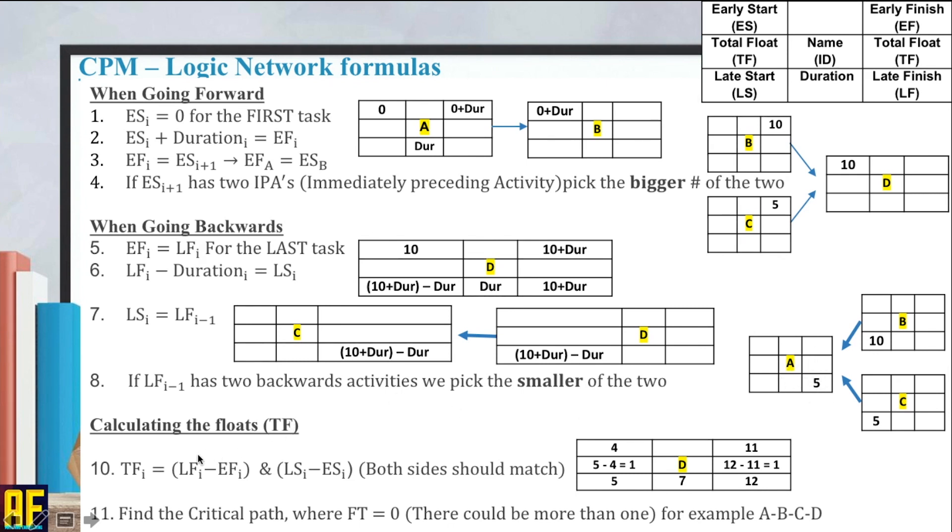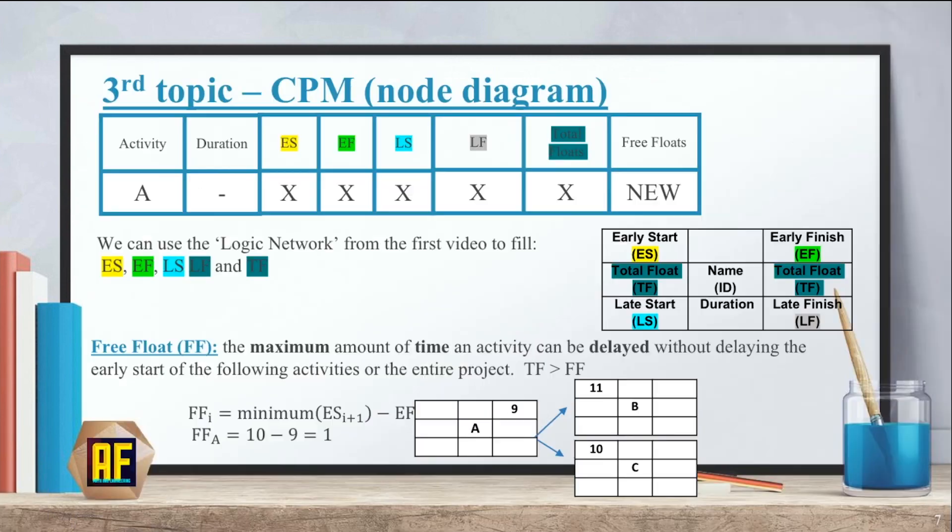When calculating the floats, we simply say that the total floats for an activity equals LF minus EF. LF minus EF and LS minus ES. Both sides should match. If they don't match, you probably made a mistake somewhere. Then once we get those, we find the critical path where the total floats equals zero. And remember that there could be more than one.